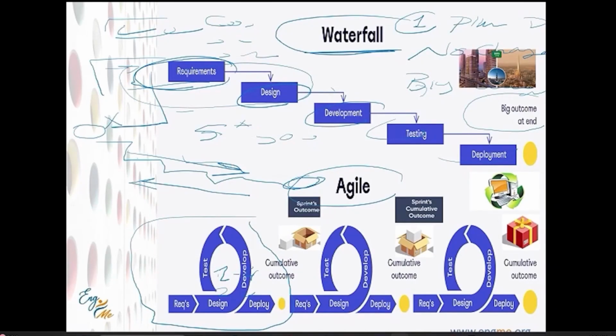So during the sprint, we couldn't change the time, we couldn't change the people, we couldn't change the requirements, we couldn't change anything. So no changes during the sprint. But before sprint or after sprint, the product owner is responsible for the backlog, so he can change priorities, eliminate any user stories or increase user stories. The sprint is fixed in terms of time and resources. So no changes here, either the requirements or user stories, no changes during sprint.